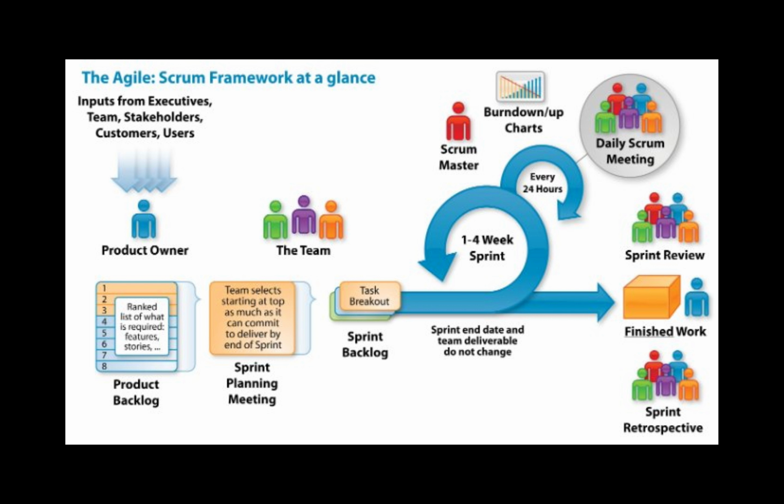Those user stories are then broken down into tasks. So each user story, for example, has a design task, or an architecture task, or a QA task, or a development task. Those tasks are added to it. In one sprint, all those tasks are completed. Every day of the sprint, the team gets together and does a daily stand-up. At the end of it, what you see on the right side, the finished product is brought from the sprint. It's shown to the team, and the feedback is gathered, which goes back into the backlog. At the same time, this team gets together and does a retrospective and sees what can we improve. And this is basically Scrum all over.